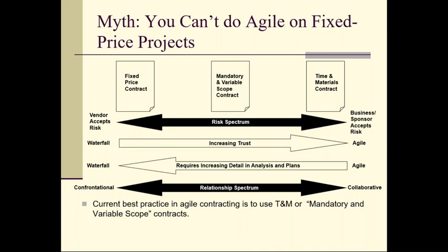I'm going to build in plans to deal with that should it go wrong. So I'm going to build in cost and schedule contingencies to deal with these identifiable risks. And then probably a little bit extra contingency for the unknown risks, the things that could jump out of nowhere and surprise me that I never expected. Sometimes we talk about Murphy's Law. If something can go wrong, it probably will. There's always going to be something that surprises you on a project. So this extra contingency is put aside to deal with that stuff as well. So we've added in tons and tons of risk contingencies, typically into these fixed prices.